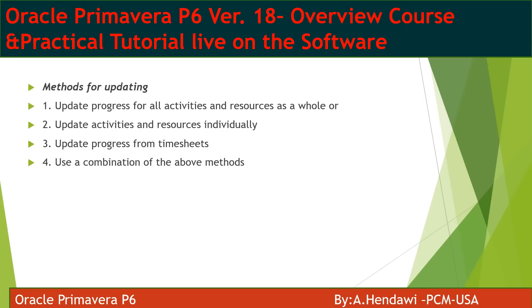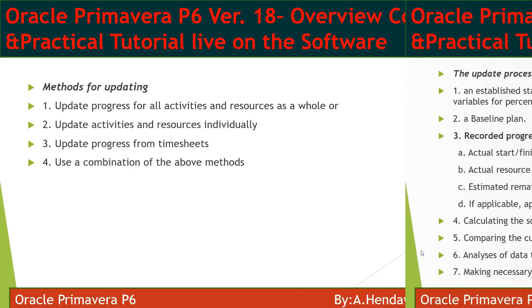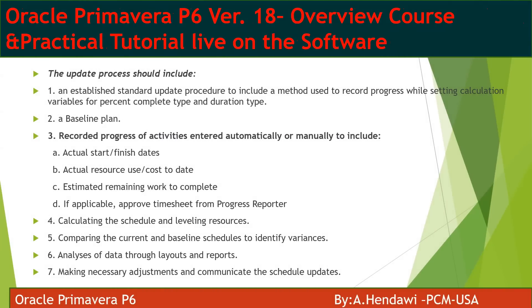Methods for updating the schedule: Update progress for all activities and resources as a whole — if the project is very important and mentioned in the contract conditions, you have to update all of that. Update activities and resources individually. Update progress from timesheets, or use a combination of all these methods based on the requirements of your contract.